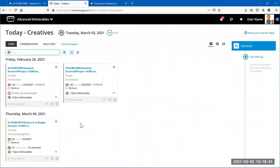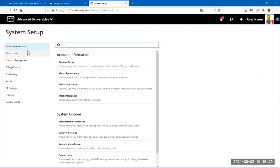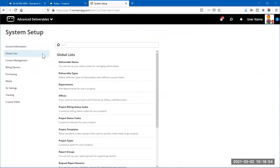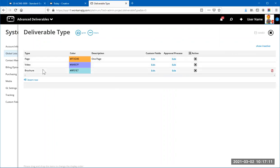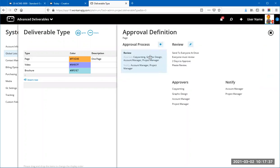Let's talk about Deliverable Types in more detail. Going back to Transaction Preferences — when I say 'workflow' I mean the approval process. Because I've enabled Deliverable Types, under Global Lists is where you find them. Opening that list, you see Page, Video, and Brochure — the three types I've enabled. Here we can determine the approval process for each type, taking the decision out of the hands of whoever is creating the deliverable at that moment.